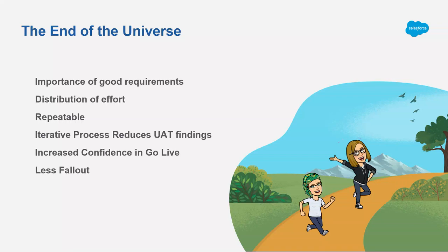So now that we've taken a look at our requirements gathering milestones, and Lisa's been able to do the demo, we want to give you some high-level takeaways from our experience. So the importance of good requirements, I'm going to harp on that over and over and over. We log all of our project time, and over the time that we've done data migrations, we've seen a demonstrable decrease in the amount of project time, as well as the UAT time and QA time, when we've developed good requirements up front, we've dealt with the exceptions, and we've reviewed that in detail with the client. So I just really want to emphasize that.